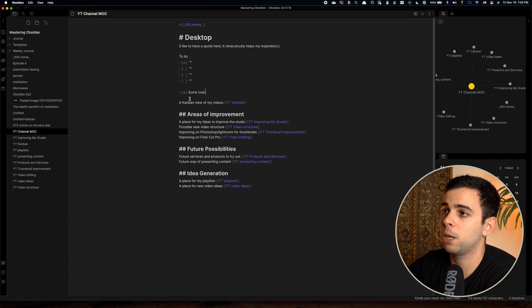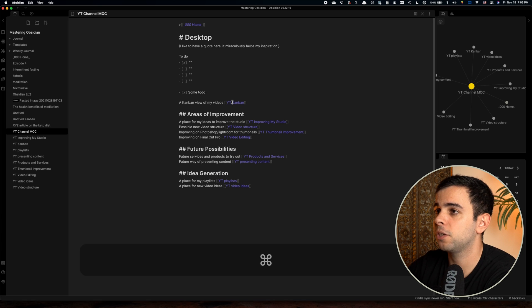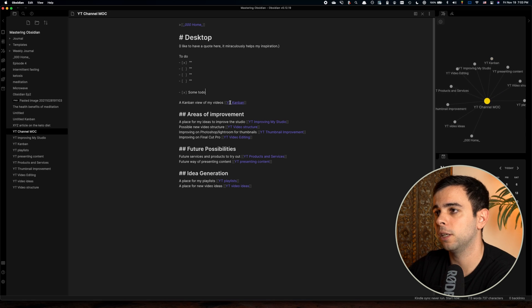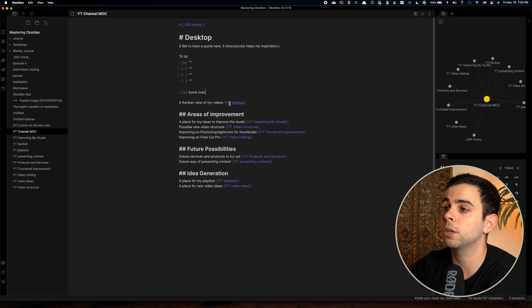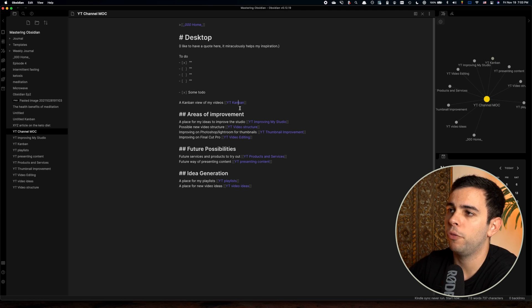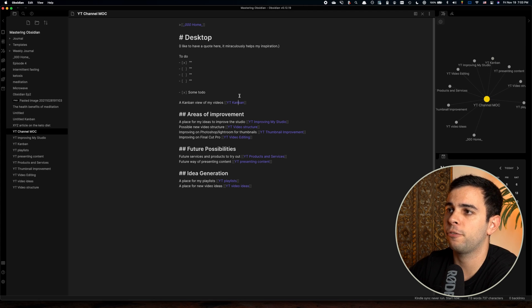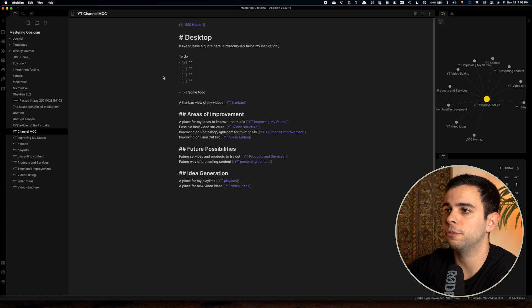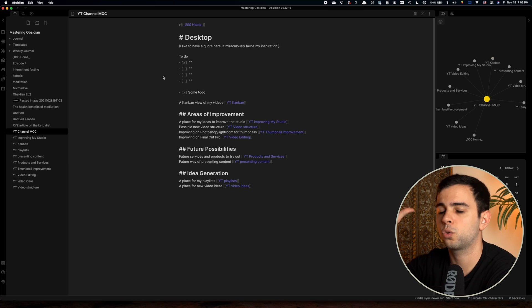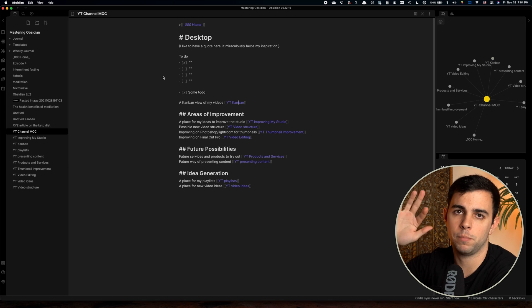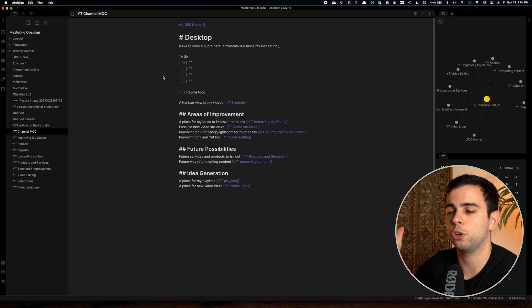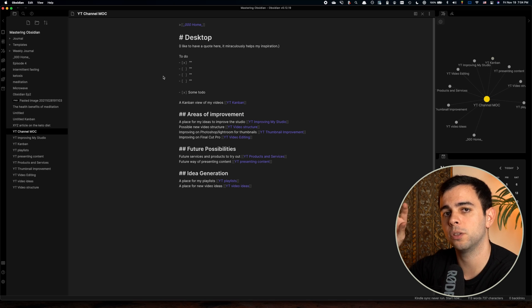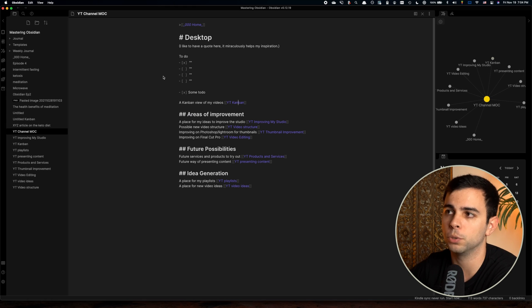All right, next up, we have a Kanban view of my videos. This here, I've actually went over it in episode two of this series, which is all about the plugins, and I use a Kanban board to manage my videos. This is just a nice way of visualizing my videos. So I'll have a Kanban board that is the various phases of video production. So I'll have idea generation, scripting, editing, publishing, and sometimes a lot more steps in between. And as I work on my video, and I'm done with the writing and scripting phase, I'll move it to the video filming phase, and then to editing, all the way to publish.